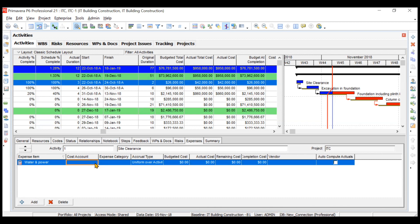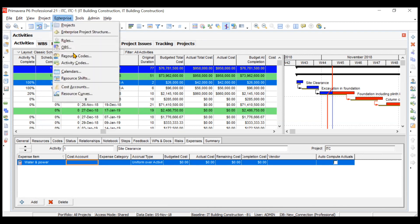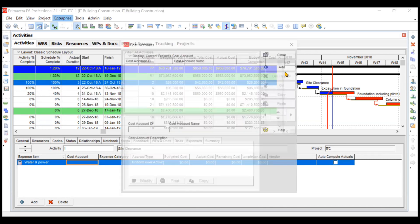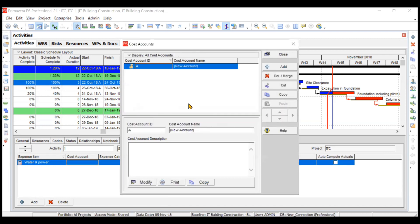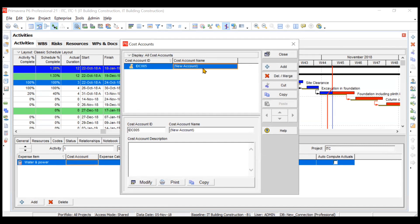How to create the cost account? You can go to Enterprise, go to Cost Accounts, and create it. For example, let's create IDC 005. This is your water and power.